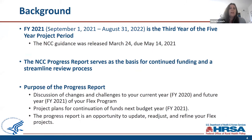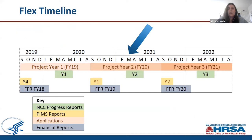Now diving into the NCC. This is FY 2021, which runs from September 1st, 2021 to August 31st, 2022 — the third year of your five-year project period. The NCC guidance was released in EHB yesterday and will be due back in EHB on Friday, May 14th. The NCC progress report serves as the basis for your continued funding and incorporates a streamlined review process. We are currently in March in the middle of project year two for FY 2020, and your NCC progress report is something you should be working on now.